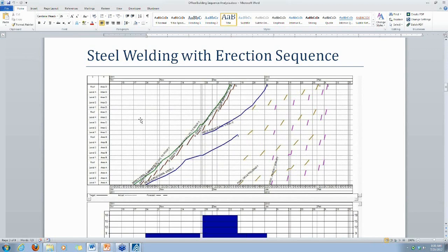And if we were planning to make the welding a continuous line, as was the steel erection activity in flowline, it would really push out the end date for this phase. Imagine that this blue line here was a continuation of the line on the A and B locations that would have carried out at least 2 or 3 weeks, pushing the overall completion of this schedule phase.